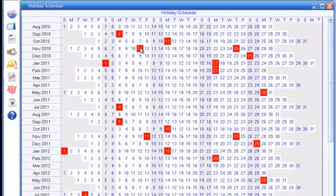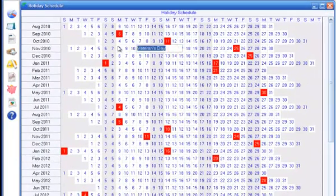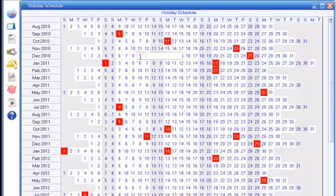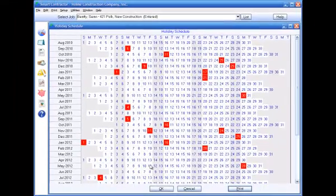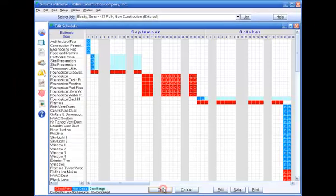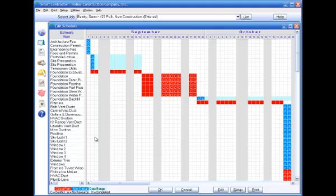You can remove any of these and add any others. Holidays set up in the holiday schedule are automatically grayed out in the job schedule.